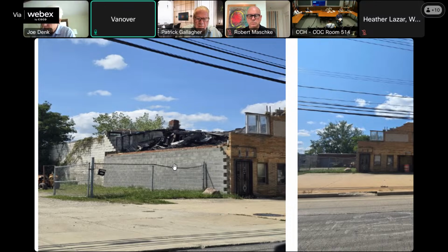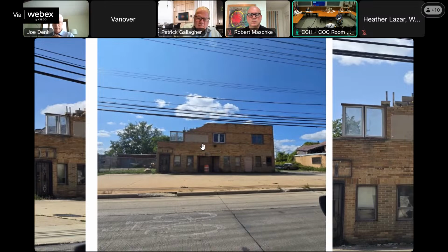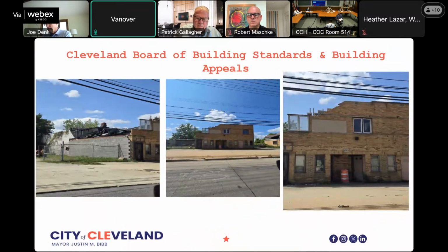So, Mr. Chairman, records do not show any permits for any proposed activity on the structure. It's obviously hazardous. We don't object to more time, but there needs to be a separate application for permit, even for the partial demolition, in preparation of the new work. A work permitted on the adjacent structure needs to be independent of, even how it's contracted is irrelevant to us. But there needs to be another application and permit made to show that this work is taking place and what is going forward.